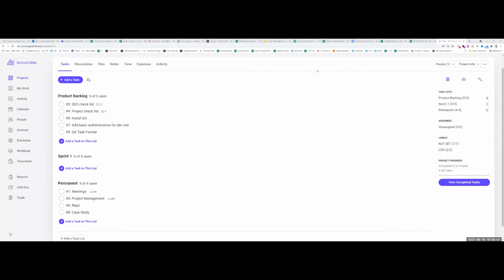And those items we need to break into the smallest possible pieces, and those pieces are part of the product backlog. It's like your backyard, or your godown, where you put all the tasks that need to be delivered. That's what we call the product backlog.